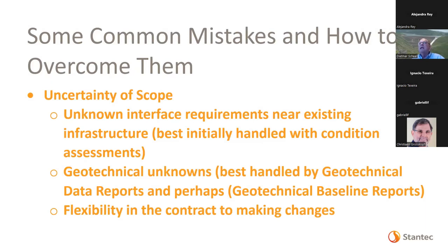Some clients, when they go to overhaul multiple units, will buy the guts of an extra unit, which they then use when they run into a problem. They have something already on site they could insert into the unit. And then they'll order another one for the next unit as they go along. So you end up with spares at the end of the process.